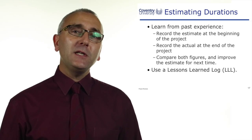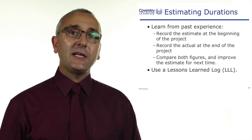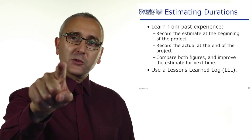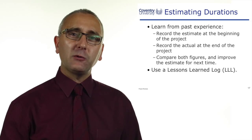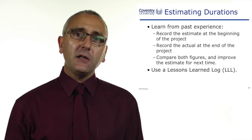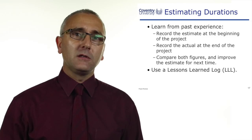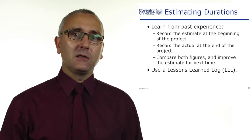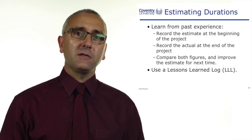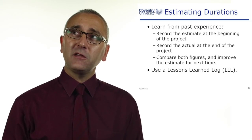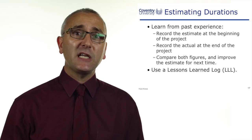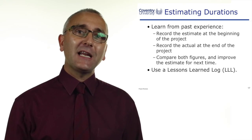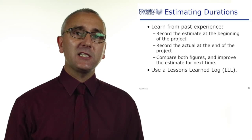This is important. If somebody says there's 20 hours and they do 40 hours, and you get angry with them — 'You said there was 20 hours, you booked 40, why was that?' — they're going to go very defensive. When you ask other people for estimates, they're going to start being defensive. If they witness you do this, they're going to think, 'I think it's going to take me 10 hours, but I'm going to say 20 to cover myself.' And any chance of getting an accurate estimate has disappeared.